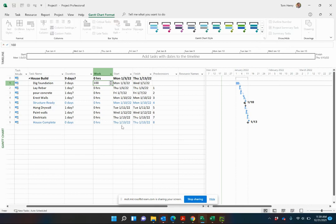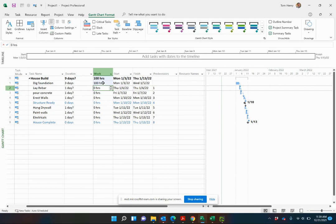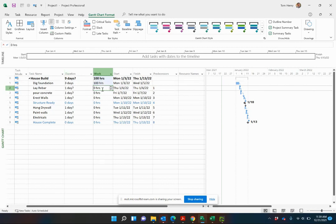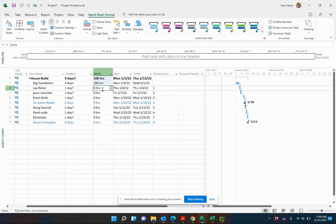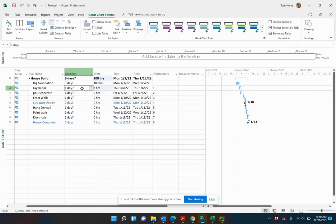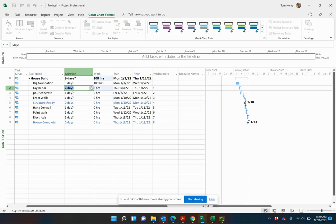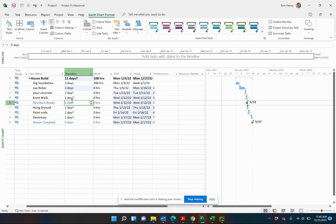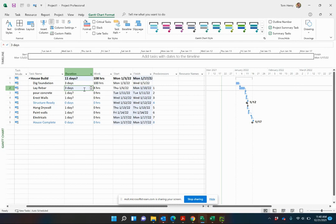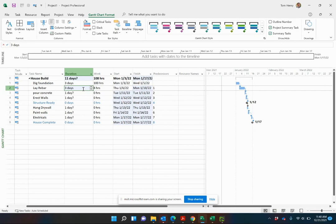If we have 10 people working it, they could get it done a lot quicker. If it's just one person, it's going to take them two and a half weeks. So we estimate the work at 100 hours. To lay the rebar, it's probably only about eight hours of work. Generally takes, you know, you have to go in and put some in and then come back another day. They generally do that over a three-day period. Eight hours of work, three days. You see the disconnect.